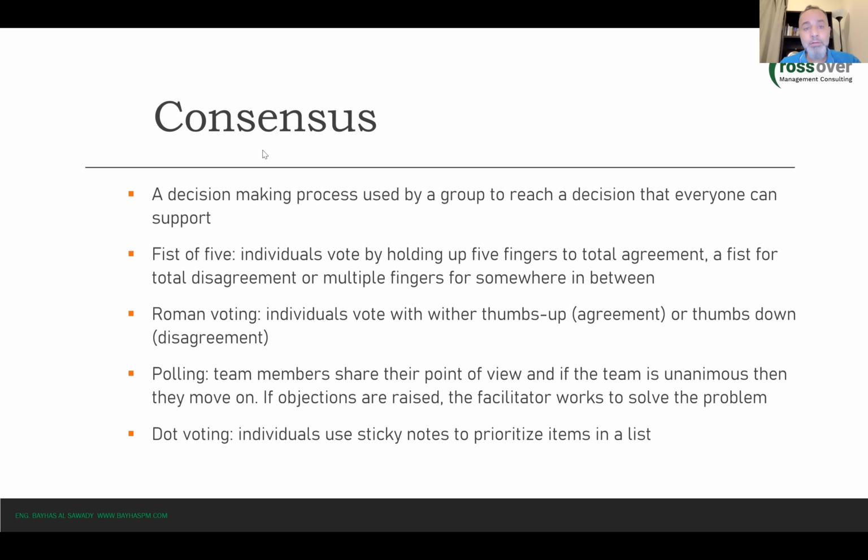So basically we can use several exercises, or we can use several tools. For instance, voting by using fist of 5. So we can do voting. We ask the team who agrees that this user story has a complexity of 5, for instance, or 4, or of 13. So now the people can vote, but they vote by their 5 fingers.